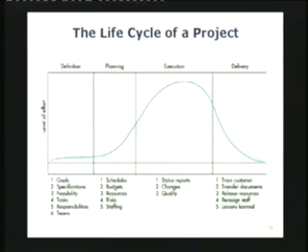We looked at the life cycle of a project. This is something very important for us to realize. We don't do everything all at once. We have certain stages, and one way to remember this is C, D, E, F. C is conceptualizing. D is basically detail the planning, execute, and then finalize the project. That's like the 4 stages through which we go.